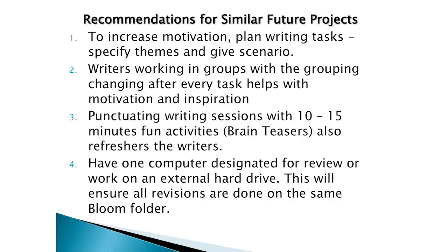And then what we did also was to have one computer designated for review with a hard drive, so that if a project staff reviewed a book and then the writing trainer needed to see that the review was made, all we needed to do was to get the hard drive or to work on that same computer. So this ensured that we didn't have revisions done in different places, and then lose track of which is the revised version and so on. So those things helped us to be able to overcome some of the challenges that were mentioned.